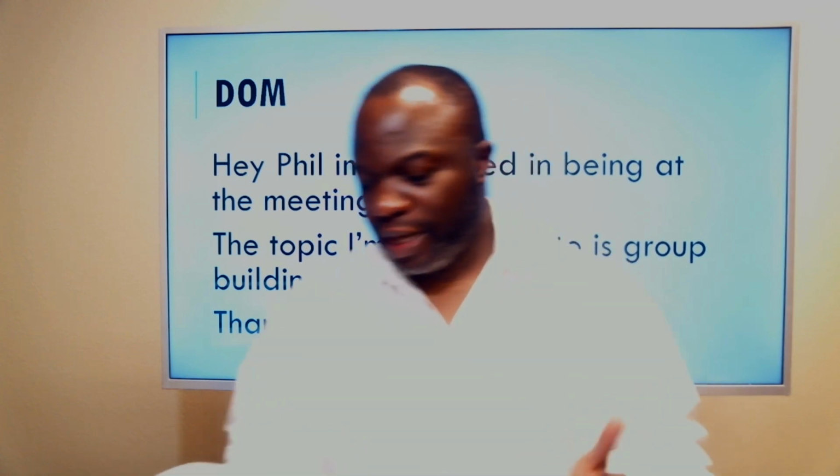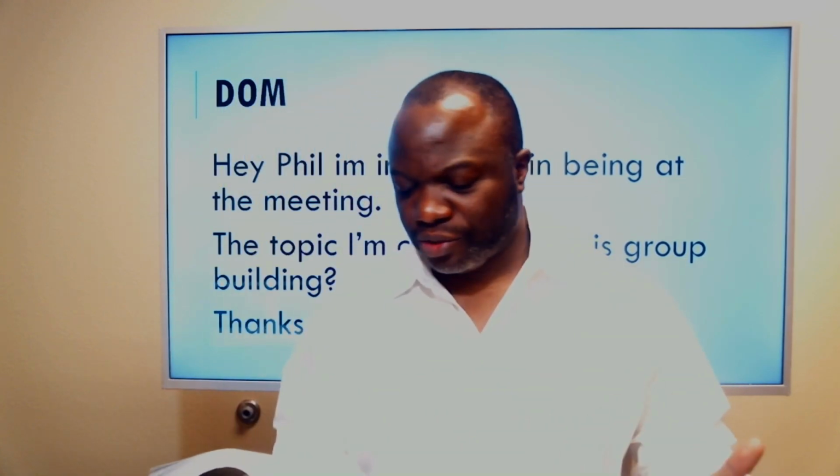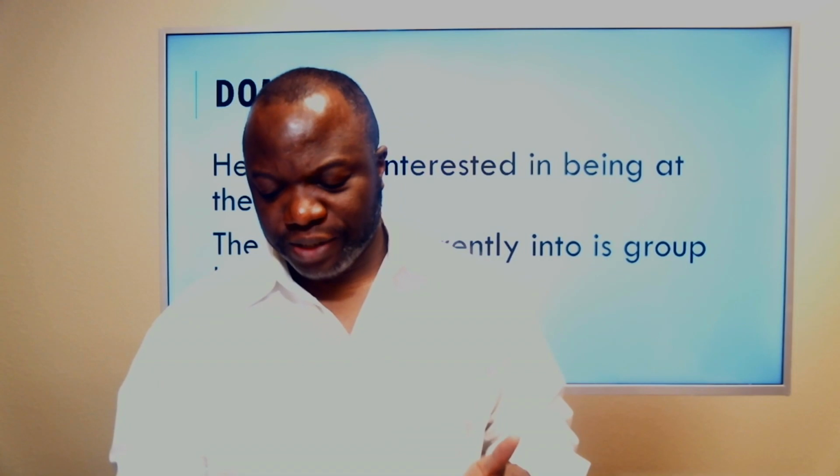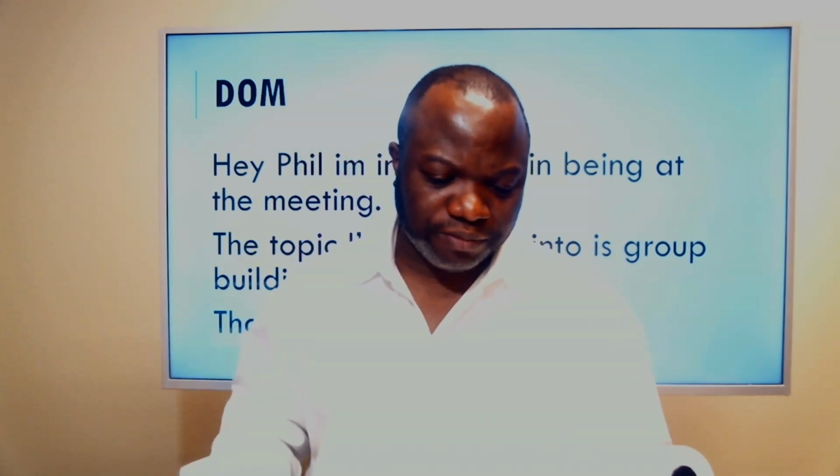And that is on page 341. So it says team building is conducting activities that enhance the team's social relations. You see, it's all about those social relations, and build a collaborative and cooperative working environment. Team building activities can vary from a 5-minute agenda item in a status review meeting to an off-site professionally facilitated event designed to improve interpersonal relationships. The objective of team building activities is to help individual team members work together effectively.